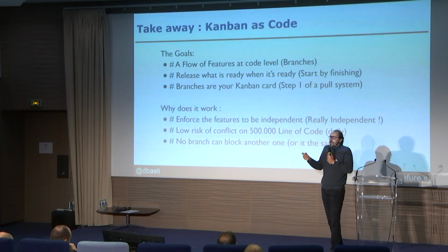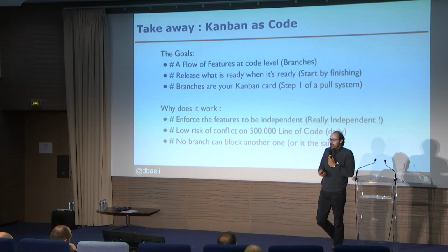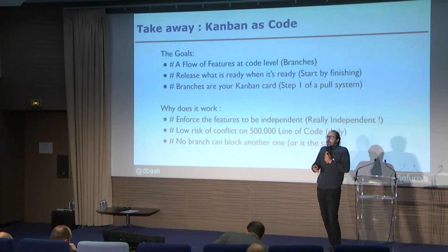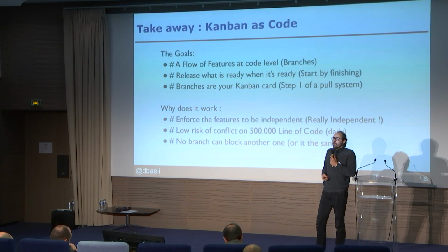If I have more than 40 branches with 20 devs, I have an issue. But limiting the number of branches would be a good way to improve the system and to understand if things are getting faster by limiting the number of branches. And that's it.